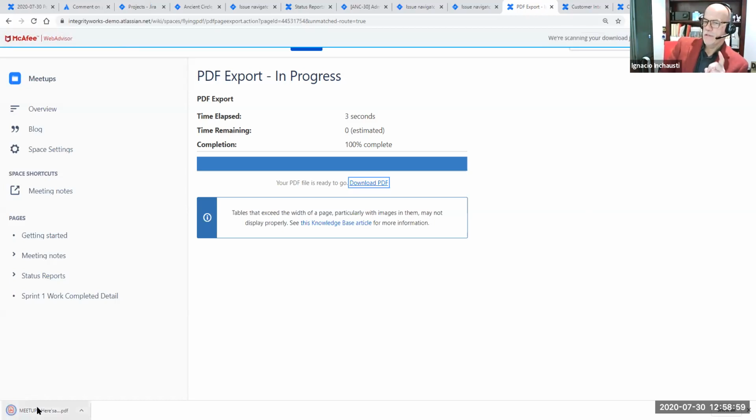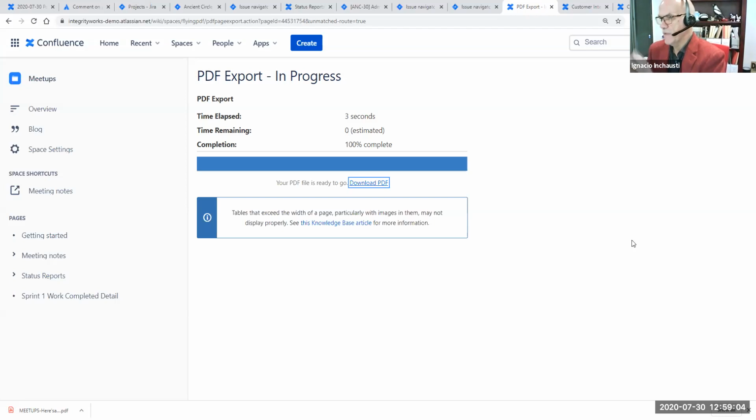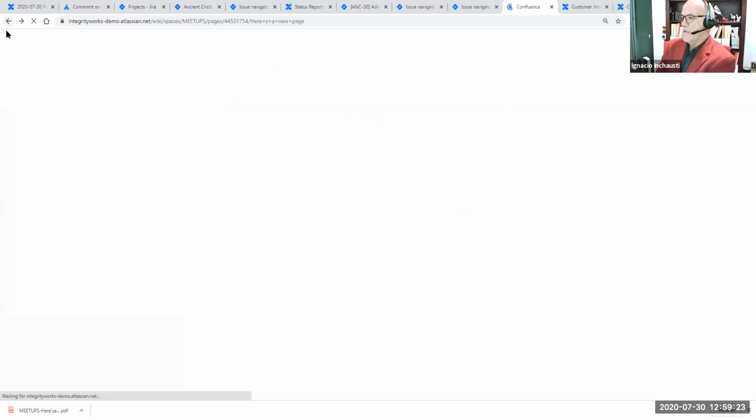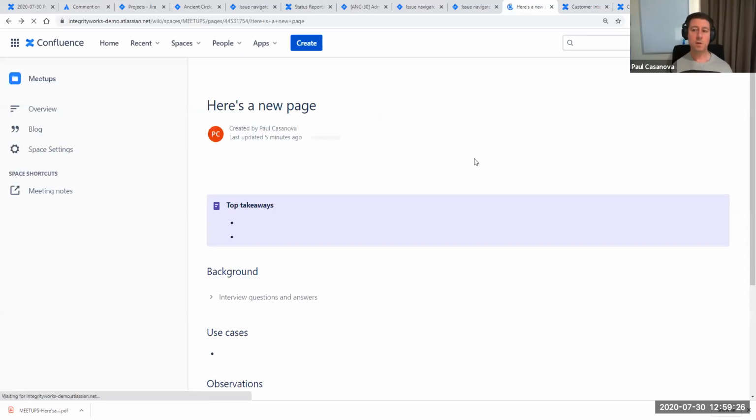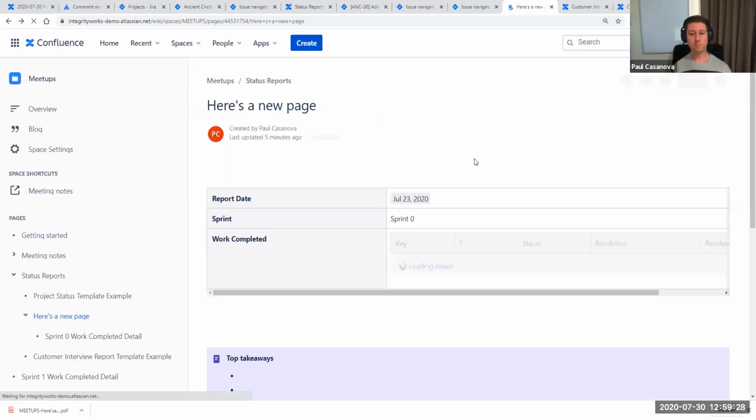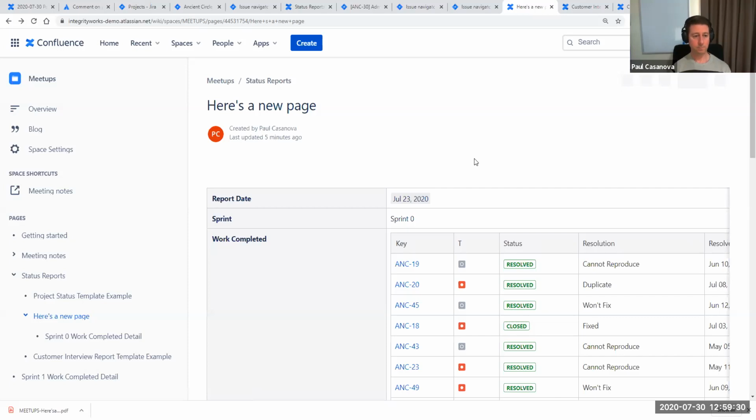Yeah, so what I was saying is that you're right, it is dynamic, and as time progresses and statuses change and updates are made, you can't go back to that same status of a week ago because it will have been overwritten and updated. So you're saying the point is take a snapshot, a photo of it, PDF, and store it. And so if anyone wants to have a look at what happened 2 weeks ago, we can then say, here's the evidence? Yes, exactly. So it's not the Confluence page itself that changes, it's the content that we've got within it that's dynamic. That's exactly right.